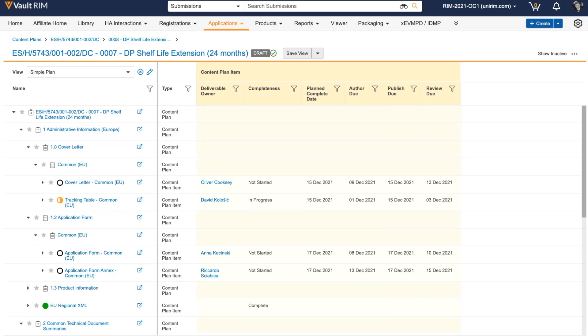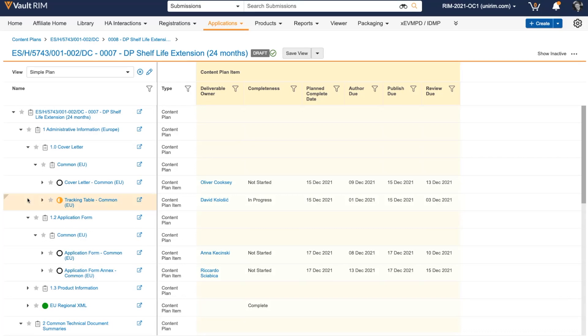When we want to start planning individual submissions, there's no better place than our submission content plan, which acts as our single source of truth for managing submission deliverables and performing document management tasks. Utilizing a global content plan or core dossier within a submission content plan allows us to copy all core documents that are likely to be reused across different markets.